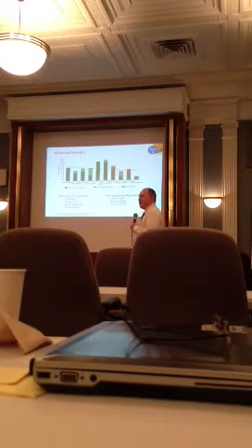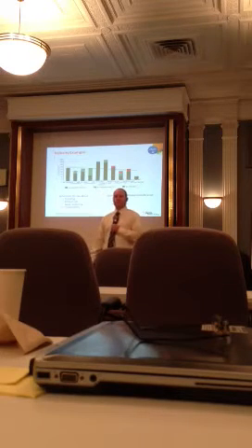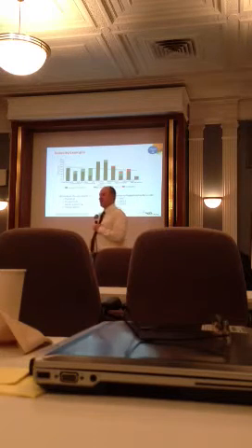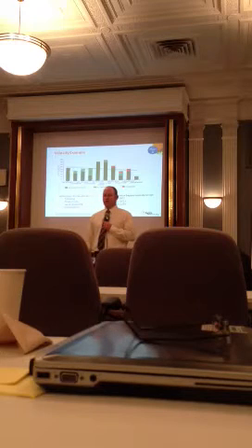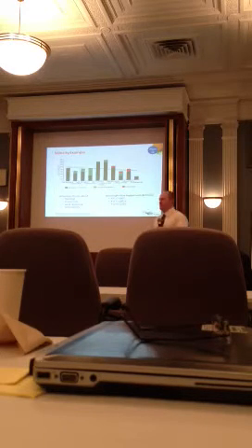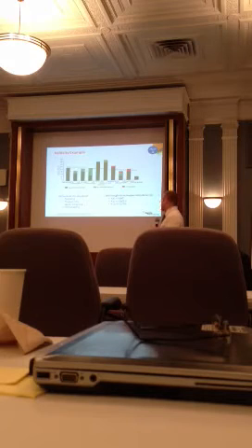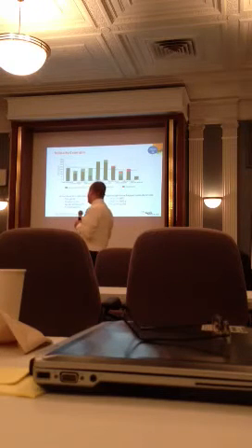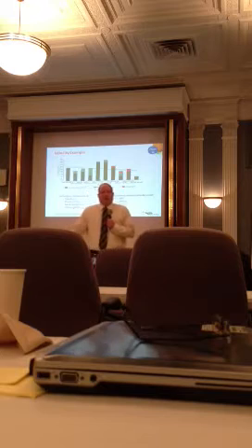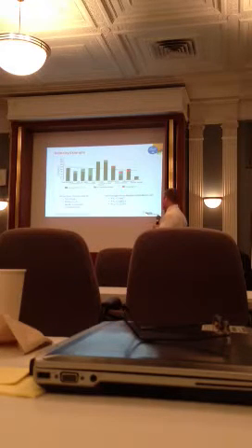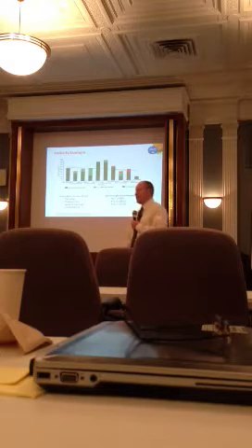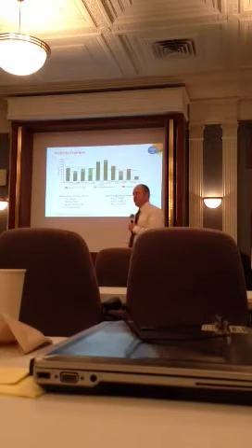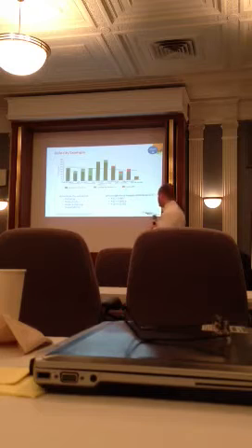This trend line is going down, right? Good or bad? I don't know that I'd say good. Better question, why is my trend line going down? Because of the holiday. Exactly, right? So here, you're at the end of the year. There's nobody working, right? I'm not going to commit to 110 story points like it's back in August because I got nobody here, right? So my trend line is going down because we're getting towards the holidays. It's right over the holidays. And you can see that this iteration that ended on 12:30, my velocity is like 25 because I had one person here, all right? So that explains the trend line going south.